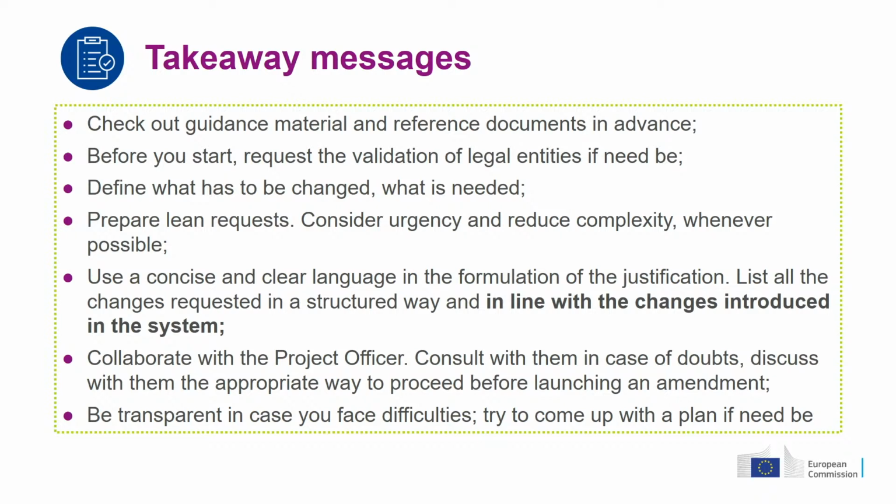To conclude, a few takeaway messages or suggestions. Check out the guidance material and any available reference documents in advance, before you launch an amendment request. If your request includes the addition of a new beneficiary, make sure that the legal entity has already been validated by our services.